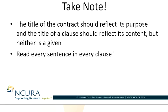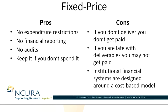With a fixed price contract, if you don't deliver, you don't get paid. Payment on a fixed price contract is tied to deliverables. If you are late with a deliverable, you may not get paid, and that can be problematic.